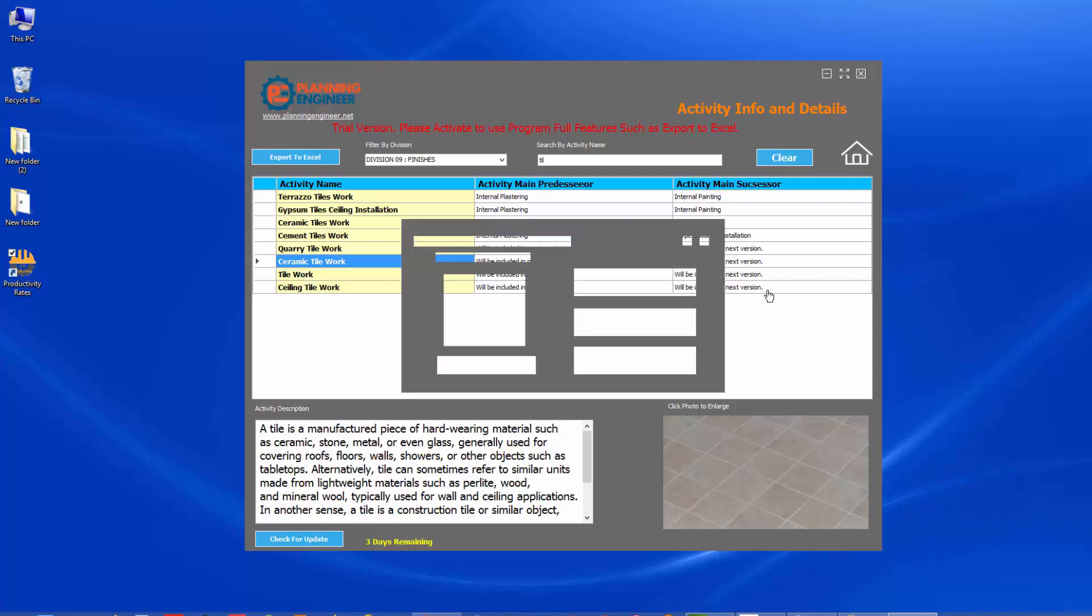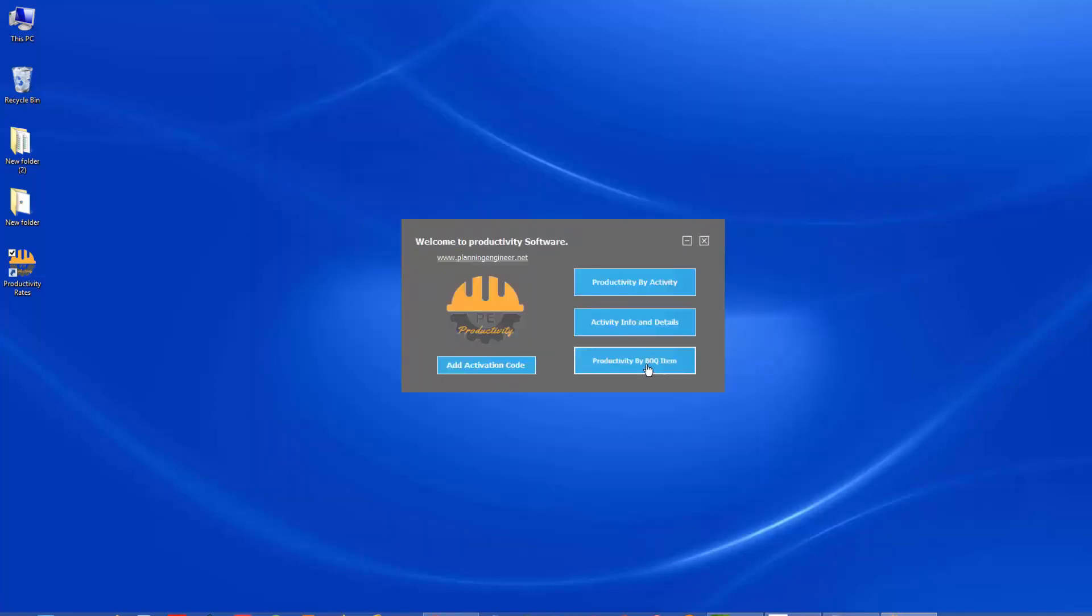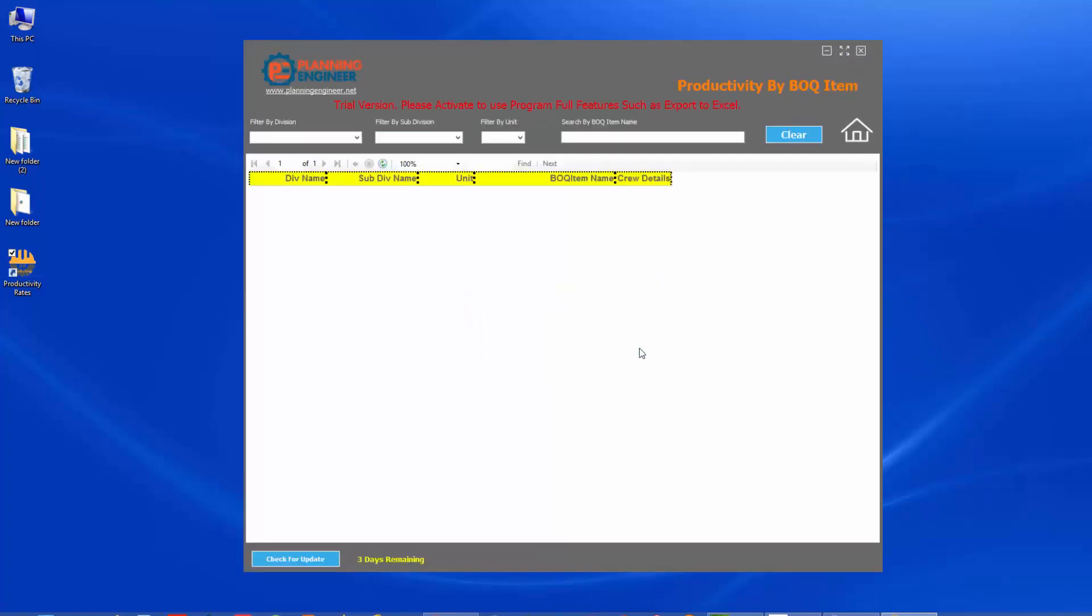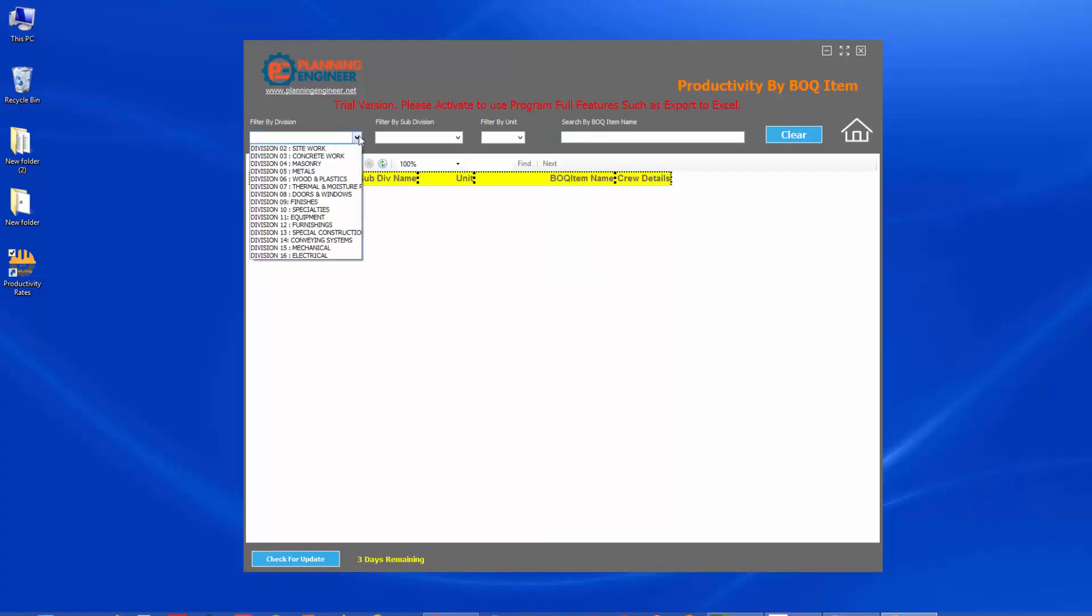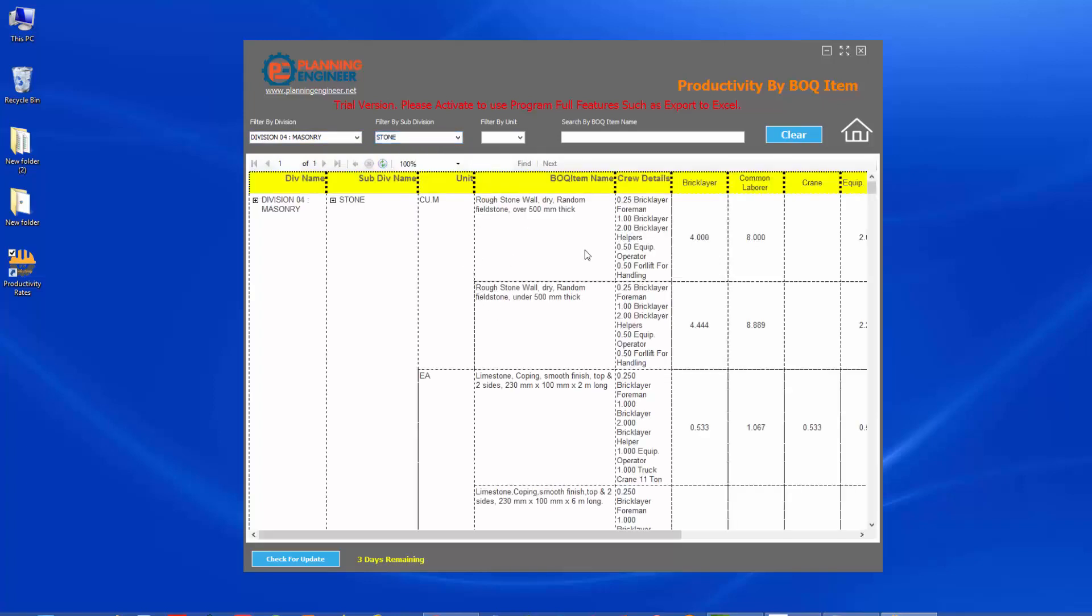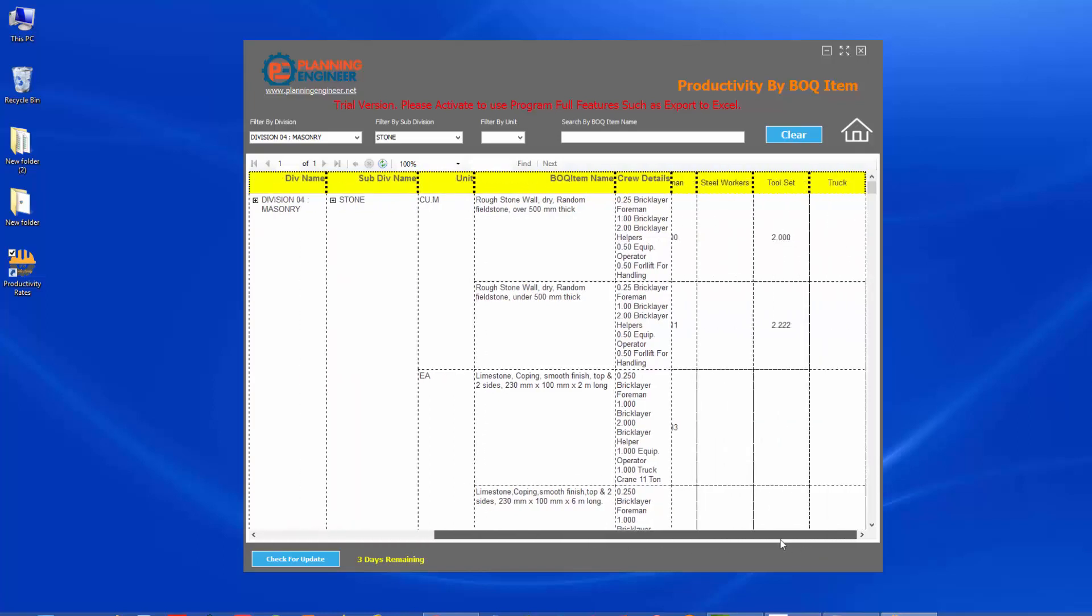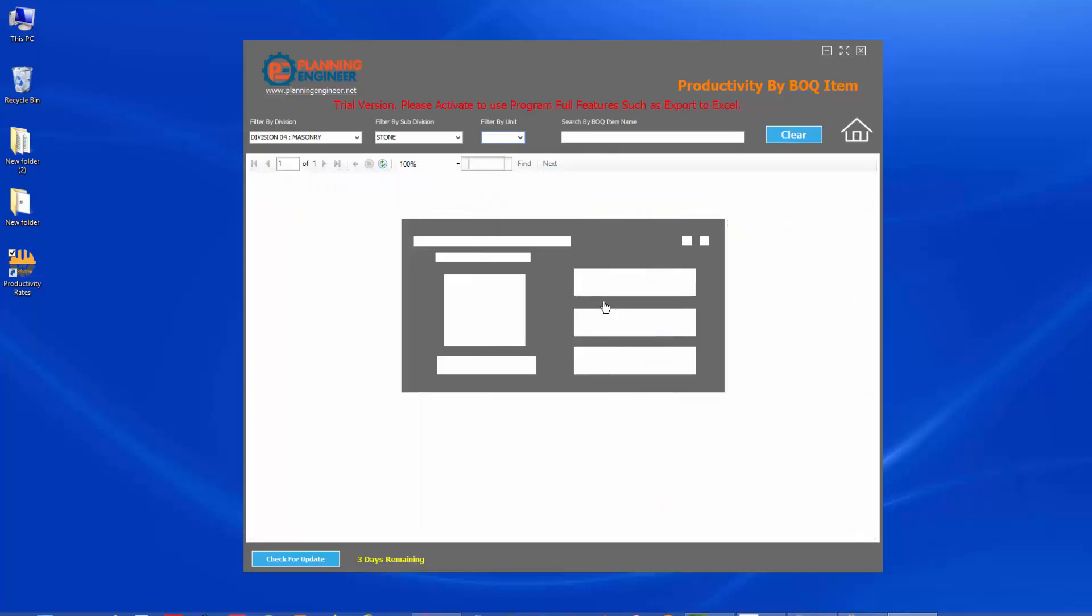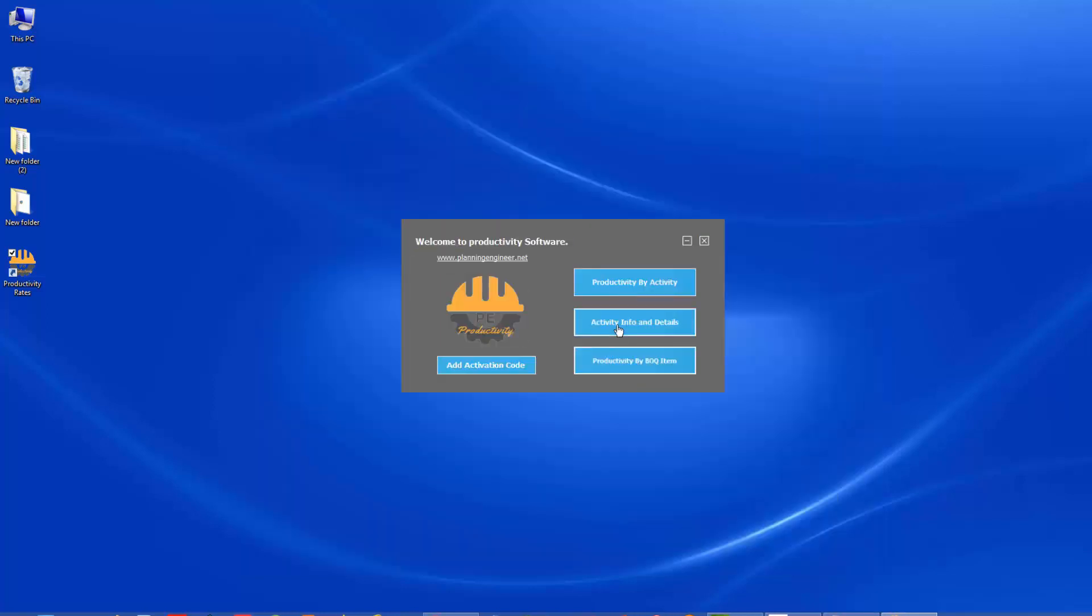In the third section here, and this is the most detailed section, you will find huge data for productivity, but we divided it by division and subdivision of work. So if we go to like masonry and then you have to choose what is the subdivision, let's say stone, you'll find very detailed information about the productivity rate. This is the division name, subdivision name, unit, BOQ item, and here is the crew details. What is the recommended crew for this item and what their hours per unit. So according to this one, you can do your plan. You can monitor your teamwork and so on. Also, you can search here or maybe filter by unit also. Okay. So as you can see here, it is very simple yet. It has very detailed information.